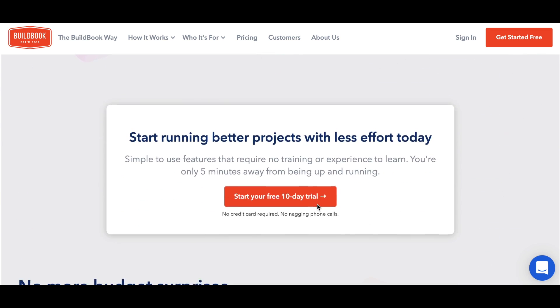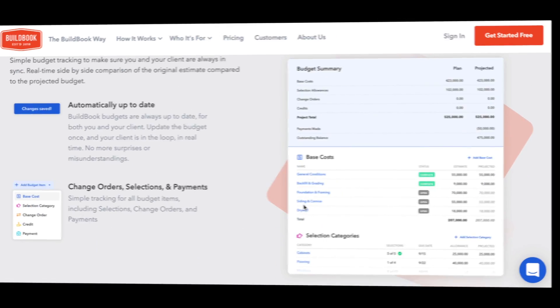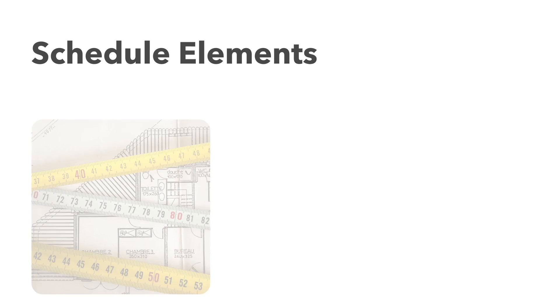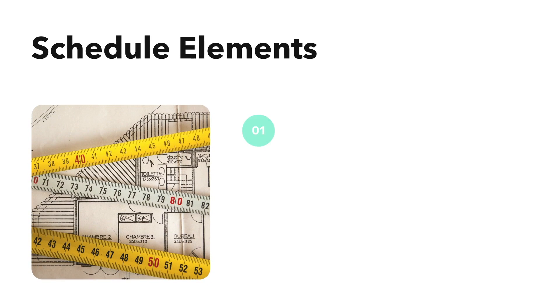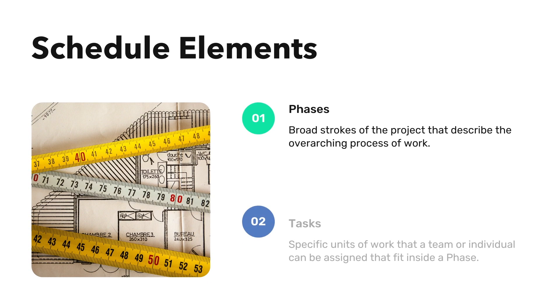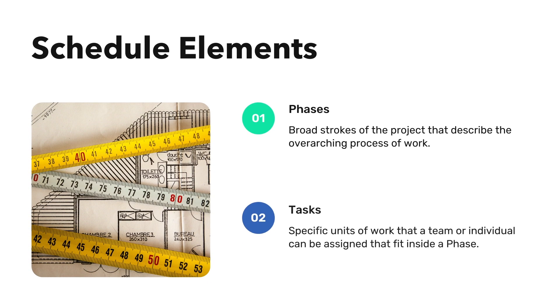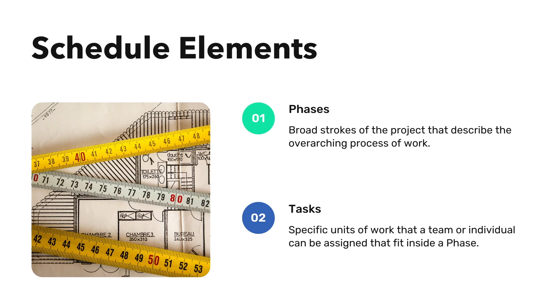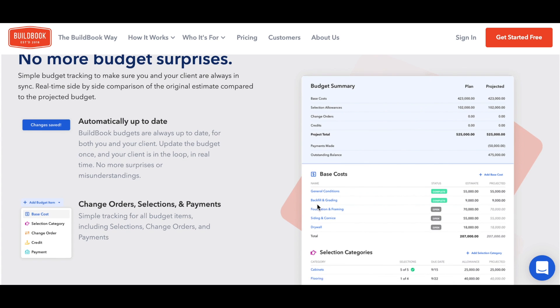Let's jump right into our example, kitchen remodel project. All you need to think about for a basic schedule are two types of elements: a phase and a task. Our phases will be things like planning, rough construction, and finishing. And our tasks are any specific items you want to itemize within a phase, like framing or countertop installation.